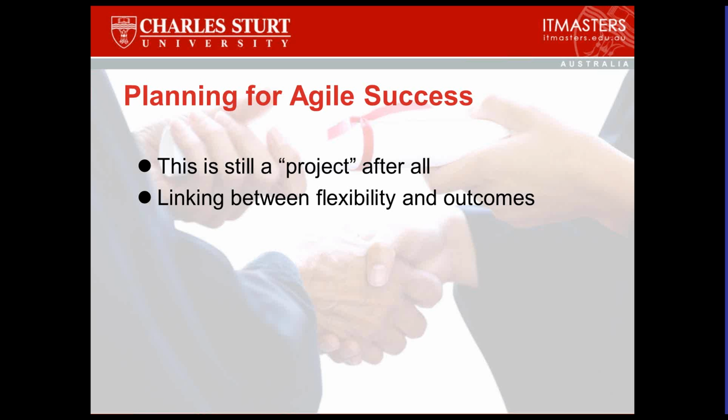Maybe we should work on a related, connected, synergistic element of the project in the next iteration that we work on, so that after 3 or 4 iterations, we have built several pieces of our project that, when put together, can comprise a working major piece of functionality for our project. And this is where release planning comes into play.